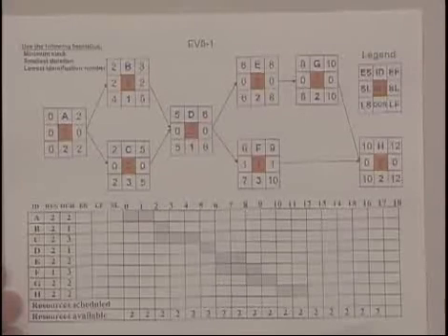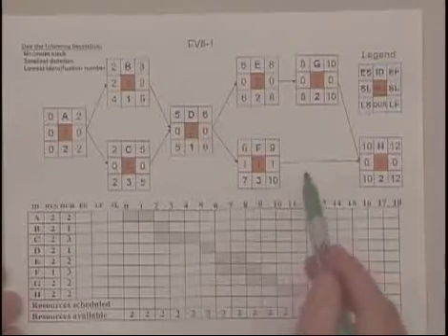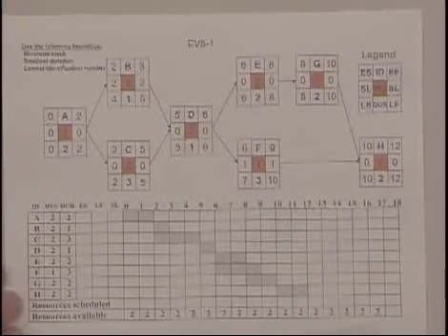And let's also assume that both tractors have to be working at the same time to complete the task. You can't have one tractor working and then be joined by a second tractor 1 week later. Both need to be present to do the work that's required. Now I'm going to introduce a constraint, and that constraint is that we only have 2 tractors available to us for this project. And we're going to look at the impact this constraint has on our schedule.